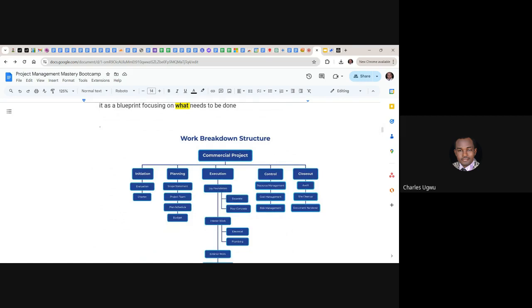Look at a scenario where you create categories of what you need to do and equally break them down into subcategories. You can even break them down into first category, second category, third category. In any way you think you are going to be able to manage the project very well, break them down into manageable parts. So that is what a breakdown structure is: breaking the project activity into manageable pieces, so that you can manage the first phase, the second phase, the fourth phase.